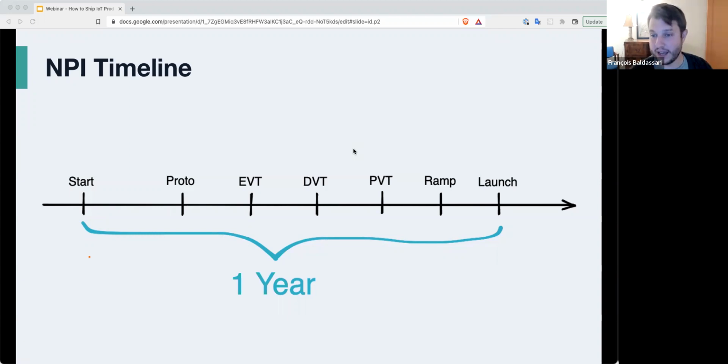I'll be curious. I think I have a poll coming up, which is asking you how quickly you've gone through NPI. 1 year is I think as good as it gets, although I'm sure some folks have managed to do it in 9 months or less on some very specific programs. But I think teams that can execute a full NPI launch in 1 year are operating at a really, really high level. And typically that means you didn't run into any major showstoppers and you were very disciplined about hitting each of your milestones on time.